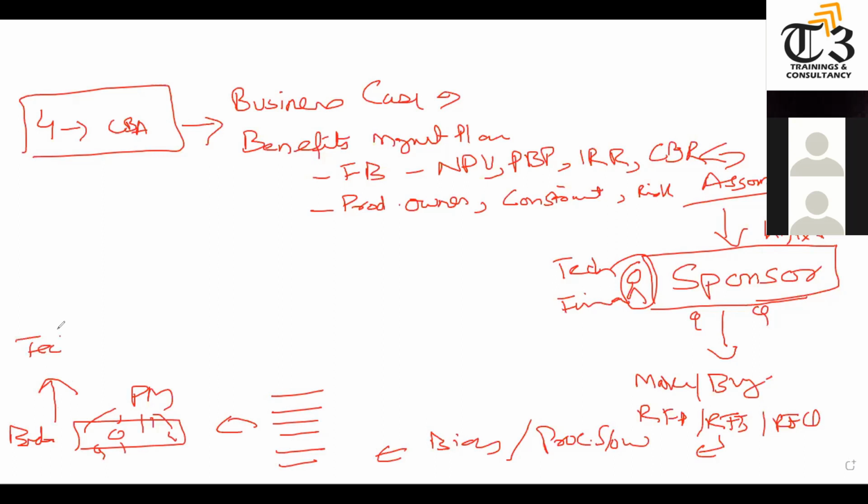Then we will do the technical, commercial and quality evaluation for the proposals they have submitted. Once done, we will select which one we need, and then we will make the agreement. Now, if we are doing predictive, we could have fixed price contracts, which means lump sum, no more, no less.